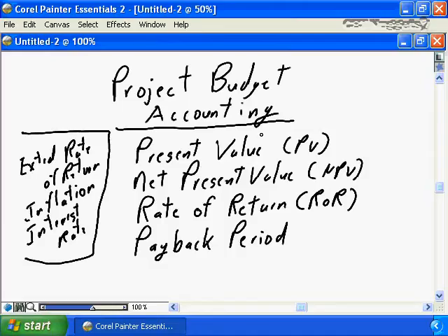Having said all of that, those of you going forward with your PMP exam, you need to be very much aware of these terms. So what do these terms mean? Present value is applying an expectation of future interest rates to determine what the present value of money is that would be received at some future point in time. So if your project is going to have a benefit statement of $15,000 in 3 years' time when it is implemented, what is that $15,000 worth in today's money, i.e. the present value, and that applies an expectation of what the interest could be earned, et cetera, et cetera.